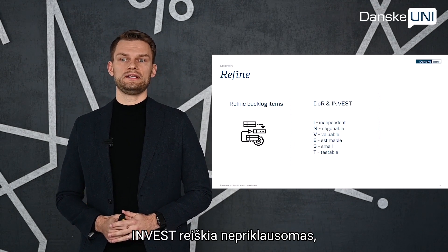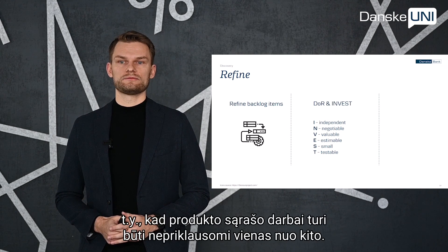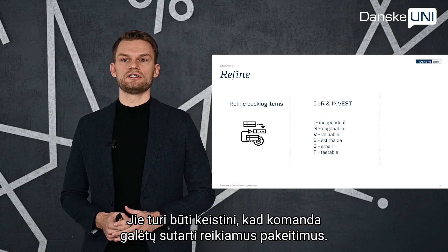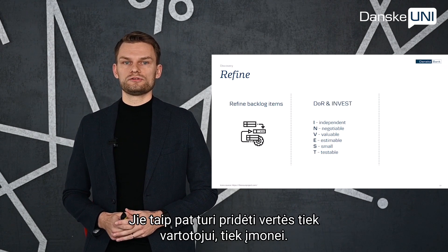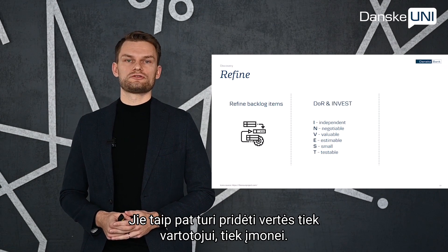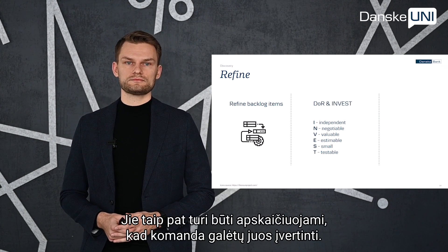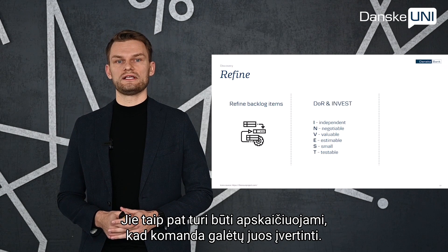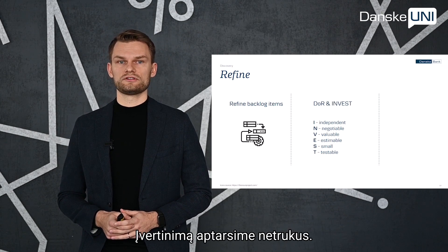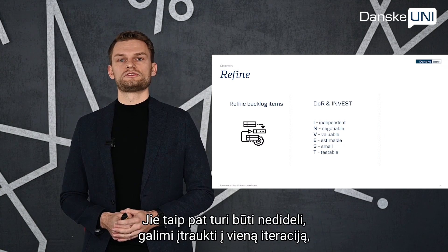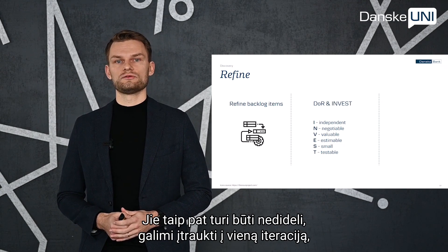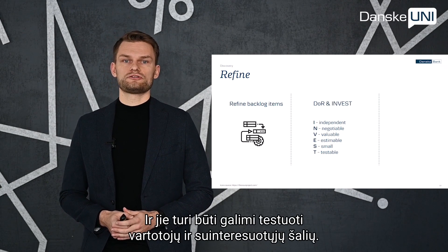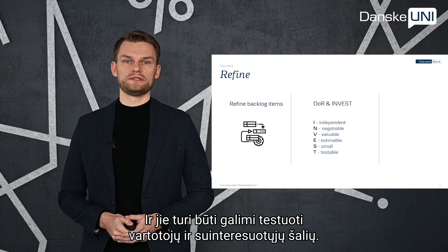INVEST stands for: Independent — meaning backlog items should be independent from one another; Negotiable — meaning team members should be able to negotiate if some changes are needed; Valuable — meaning they should bring value to end users and the company; Estimable — meaning team members should be able to estimate backlog items; Small — meaning they should fit into one iteration, or preferably even half of an iteration; and Testable — meaning end users and stakeholders should be able to test it.